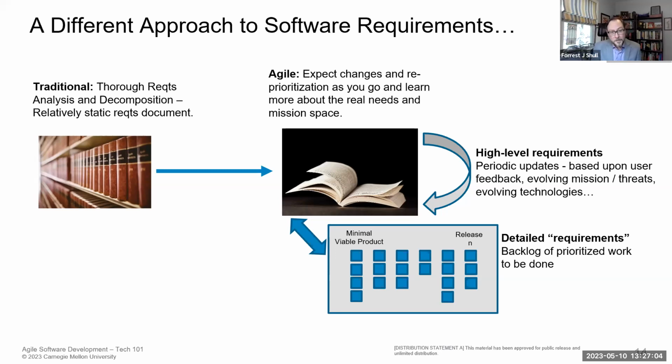That means as I change my mind, if I decide something else has to be done, there's a lot of engineering work I have to go through to re-update that chain of logic, to re-update all those requirements, to get them signed off again, and so on. And so even if it was possible to do learning and evolve things as I go, the process is not very conducive to allowing that to happen.